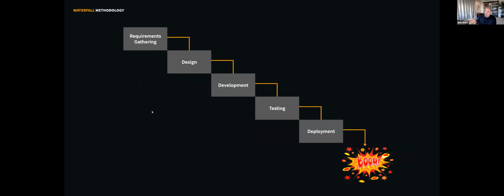So when I say waterfall, what I mean is that a project goes through these different steps: requirements gathering up front. We go into a design phase. We then go from wireframes to lo-fi to high fidelity prototypes. We then can do user testing with the prototypes. We then finish those designs. We say these designs are done, and now we send them into development. Development occurs. And then when we're finished with everything, we say, okay, now we're entering a testing and QA phase. When the QA phase is done, everything works in theory. Then we deploy, and then boom, the product is live.